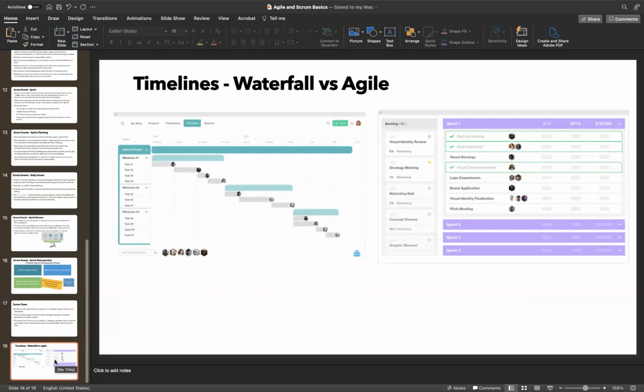The last part of it is discussing the timelines. Usually a traditional project timeline is one step at a time. You see from here that this is one step, after this the next step, the third, fourth, fifth, like that. You also have certain paths, like the top green one, which is a critical path. In that critical path, you have say four different paths, and there is a dependency. Once you complete the first, only then can you move to the second and the third, say development, testing, user acceptance testing, like that.